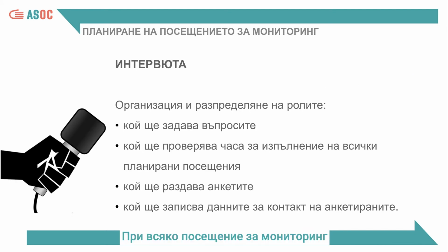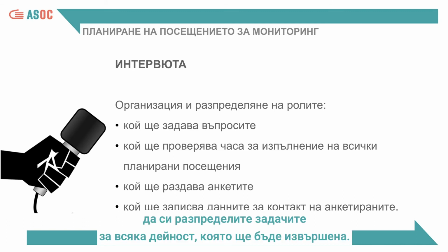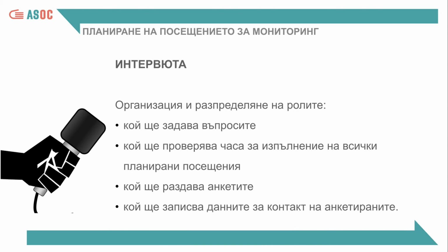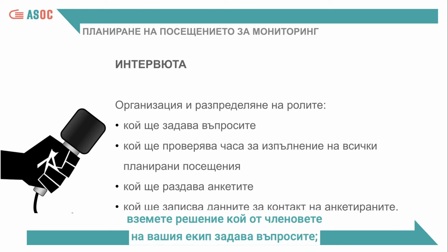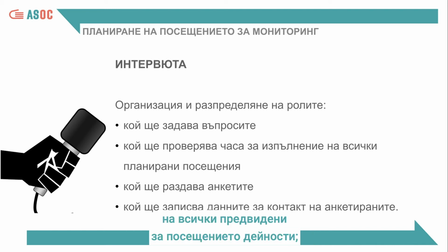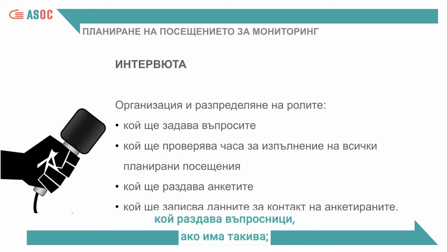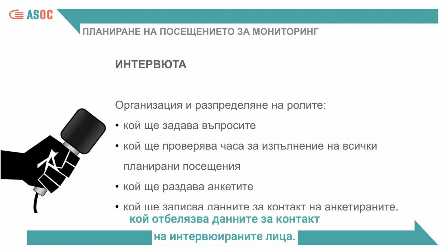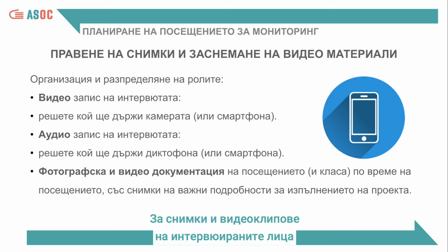On each monitoring visit, it is important to organise well. Divide the tasks for each activity to be carried out. As for the interviews, decide among the members of your team who will ask the questions, who will verify the time available to do all the activities anticipated for the visit, who will distribute any survey, and who will note down the contacts of the people interviewed. For photos and video footage to be taken of the respondents, take note of these tips.